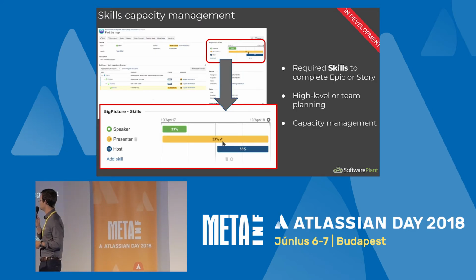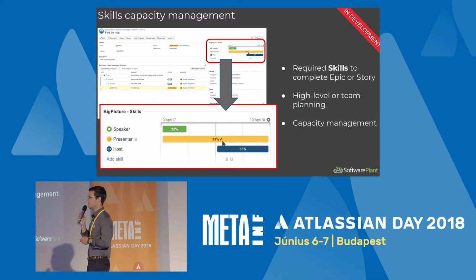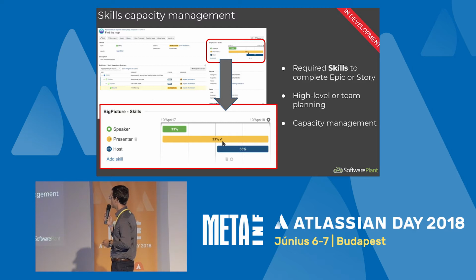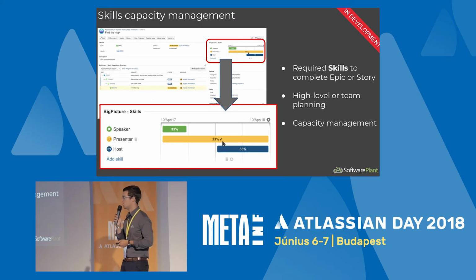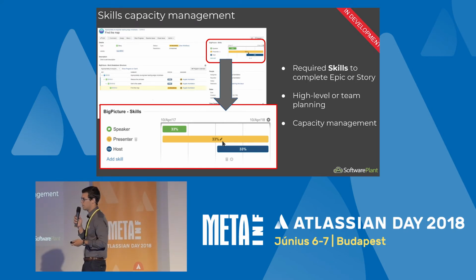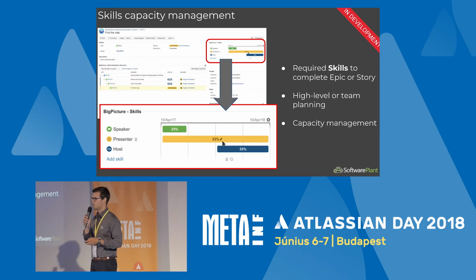The next powerful feature is, as I already mentioned, concerning skill capacity management. So we are going to create a new skill widget that is going to be available on an issue page, and it's going to give you an opportunity to define the required skills to complete an epic, if we are talking about high-level planning, or required skills to complete a particular story when we are talking, for example, about team planning. That kind of information we will aggregate, and on the resources module that I already presented, at the bottom of that module, there will be a pane that presents the skill allocation and skill capacity, which gives you a short view